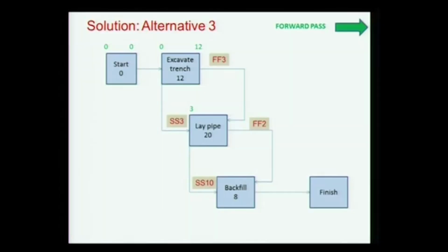So if we solve this, can you solve it along with this? We won't worry about float. Let us look at this. We had the early start, the early finish. Here we now have 3, because this is supposed to start 3 days later. I mean it cannot start within 3 days. So we are putting 3 as the early start, and 23.